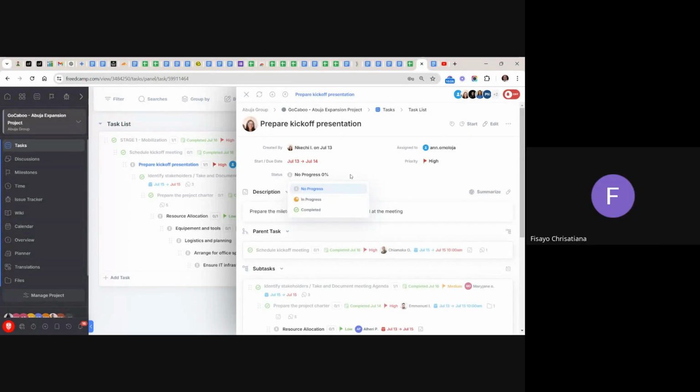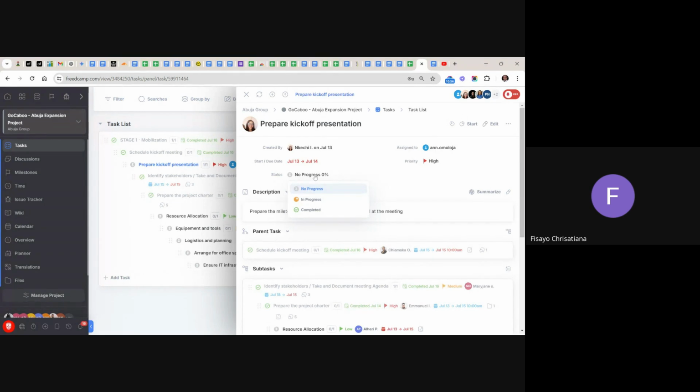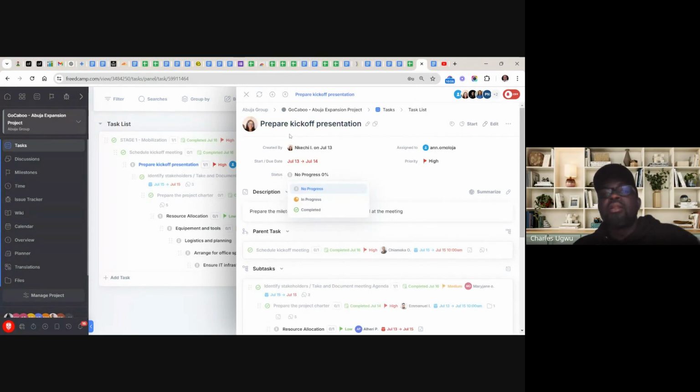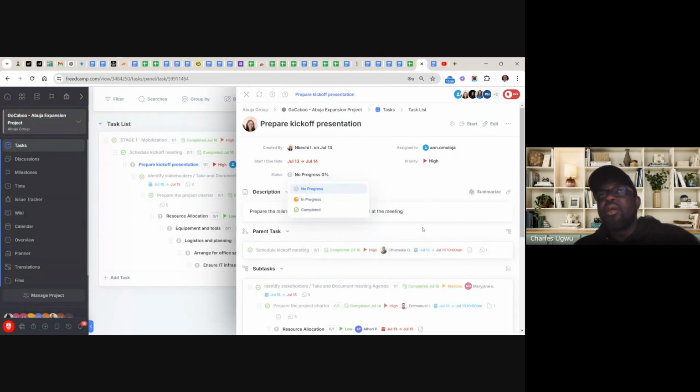Yes. Well, the person that is supposed to update the progress is not the person working on it. Whoever created this should be able to update the progress, not the person working, and only after reviewing. The person working on this deliverable is not supposed to come here and update the deliverable. It's when the person submits reports, after viewing the report, that you, the project manager, update it.